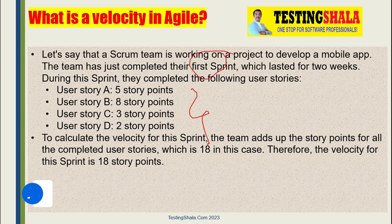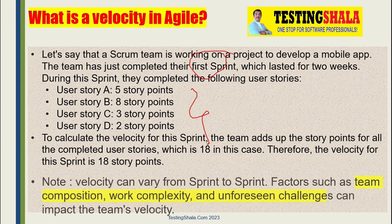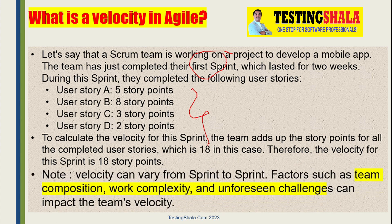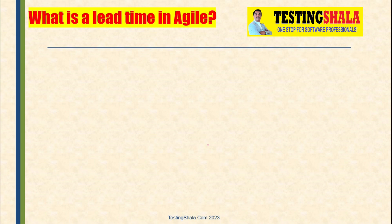That means the overall team's velocity is 18 story points. This velocity defined for a particular sprint can vary in another sprint as well, because various factors like team composition, complexity of the work, and unforeseen challenges also impact the overall velocity. This is how we calculate the velocity parameter in an Agile project.